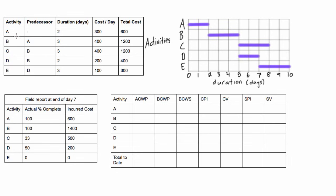This is what we would expect to happen based on our plan from our original table of dependencies. We've received a field report at the end of day seven from our field manager. We'll find day seven here and put a line in — this is our field report date. The field report says activity A is 100% complete by end of day seven, which is good since we expected it finished on day two.